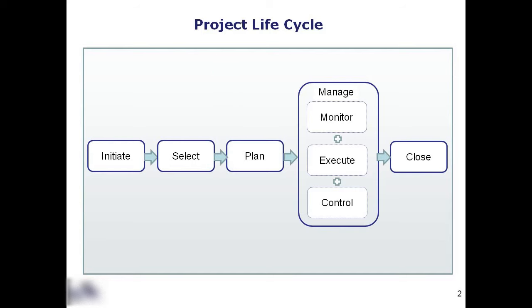Note that in version 2016 of Microsoft's Portfolio and Project Management Solution, PPM for short, the resource engagement feature can be used to provide a project with a high-level resource plan in order to evaluate the resource requirements on an initiative or business case that has not yet been approved. Such would be the case during the selection phase, so watch for the portfolio analysis feature that I will be demonstrating in a future video in support of the select phase.